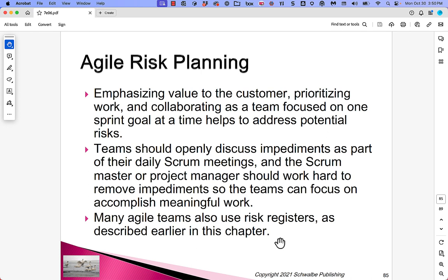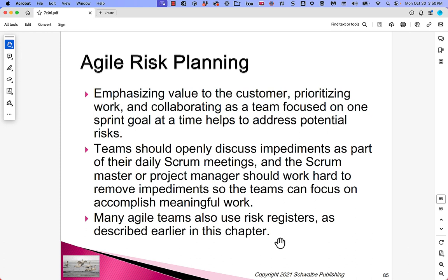Agile risk planning: emphasizing value to the customer, prioritizing work, and collaborating as the team focuses on one sprint at a time all help surface potential risks. When deciding what work to bring into the current sprint, minimizing risks ought to be one consideration alongside maximizing value. Teams should openly discuss impediments as part of daily scrum meetings, and the scrum master or project manager should work hard to remove them so people can get their work done. Many agile teams use risk registers as described earlier in the chapter.